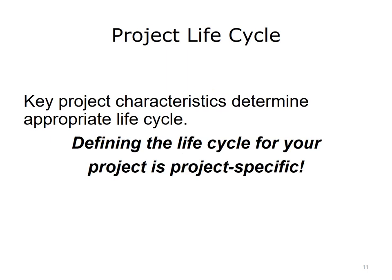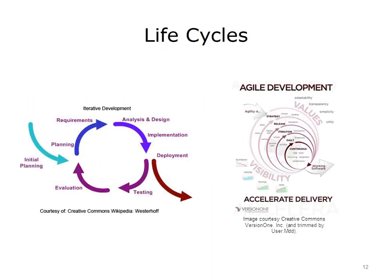The literature on project management offers many approaches, or project life cycles, to the work. Based on certain project details, such as project scope, complexity, outcomes, and timelines, the project manager decides which lifecycle best suits a project. Project life cycles include a linear method, which is typically best applied to large, complex projects, while iterative and adaptive methods are more appropriate for rapid application development or projects that occur over short periods of time and require high levels of prototype development, feedback, modification, and redelivery. Agile techniques are best used in small-scale projects, or on elements of a broader project that require a quick turnaround.